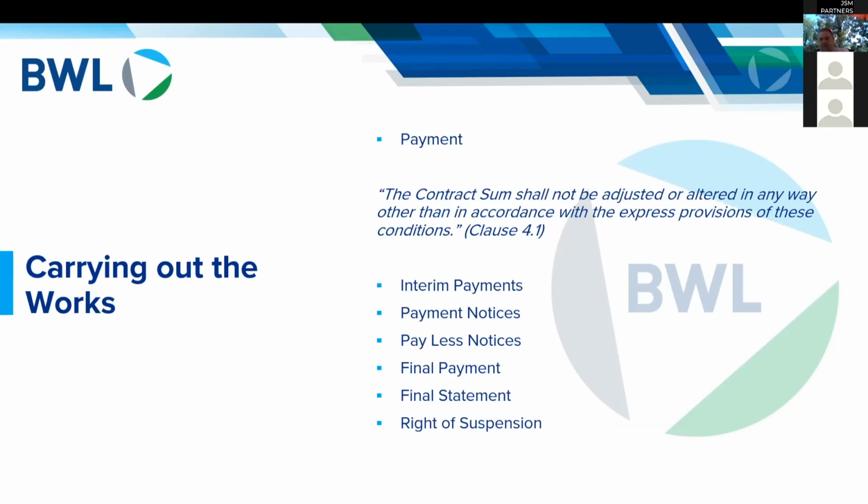Now, there are ways afterwards to deal with this situation. But typically, because the legislation was drafted to ensure cash flow for contracting firms, they've made it deliberately onerous upon the developers or the employers, so that you will get adjudications for the application amount if you get this wrong.